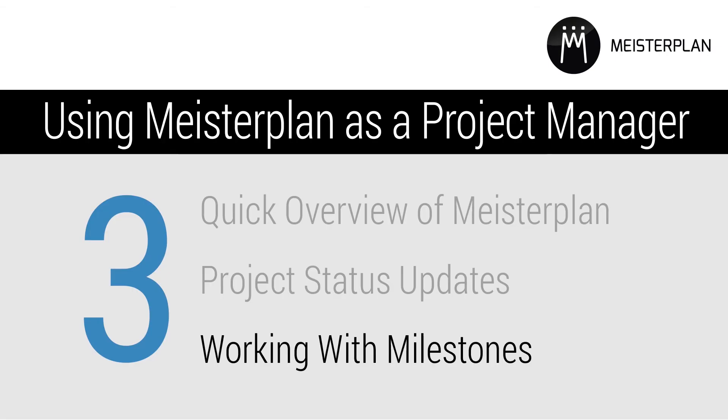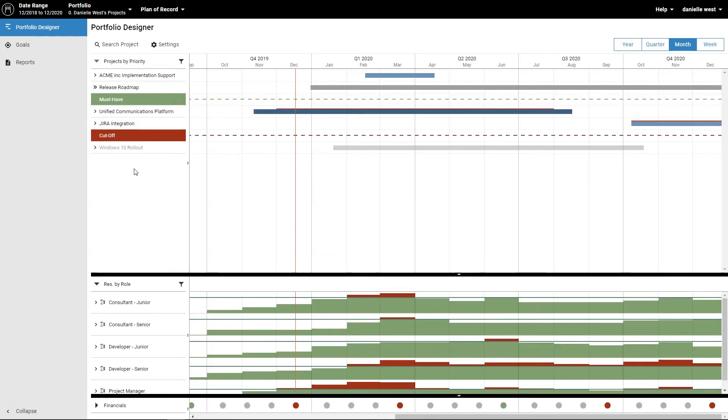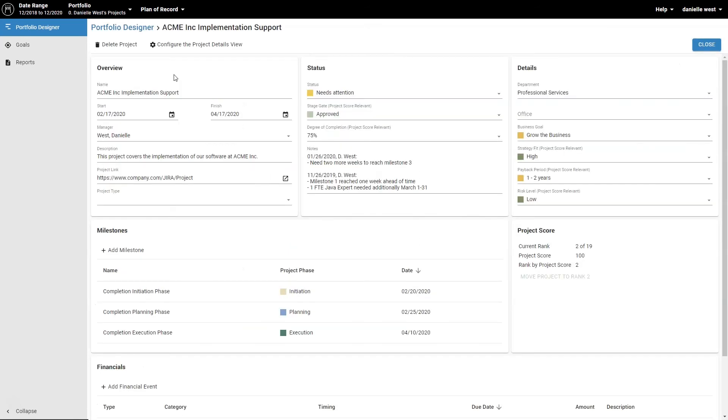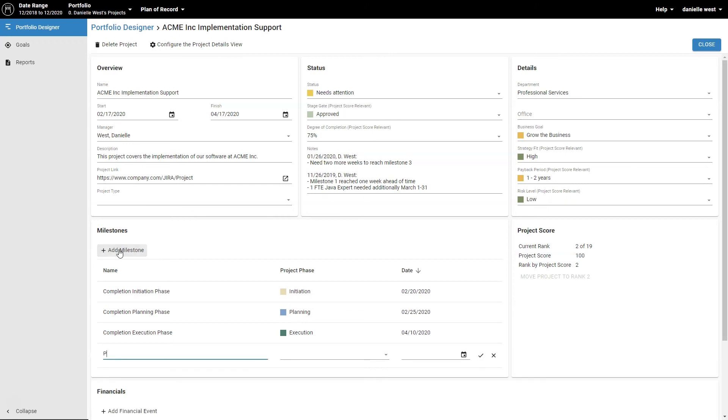Using Milestones in Meisterplan gives a visual overview of a project's progress and can pinpoint when requirements will change. Click the pencil icon next to the project name, add a milestone by clicking the plus icon, enter the name, and the date when the milestone should be reached.